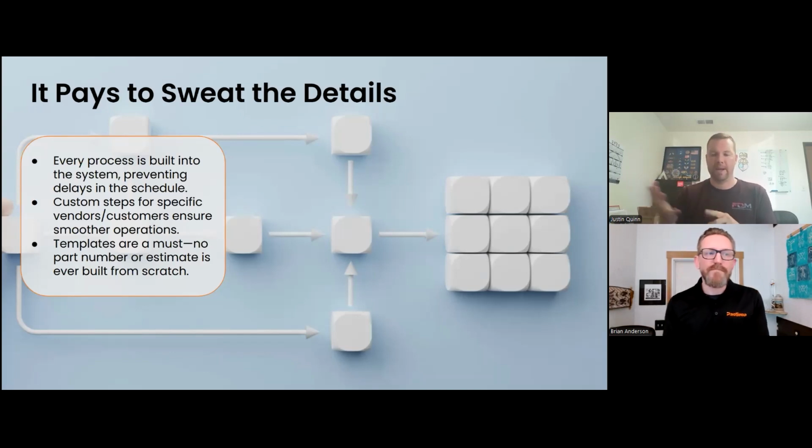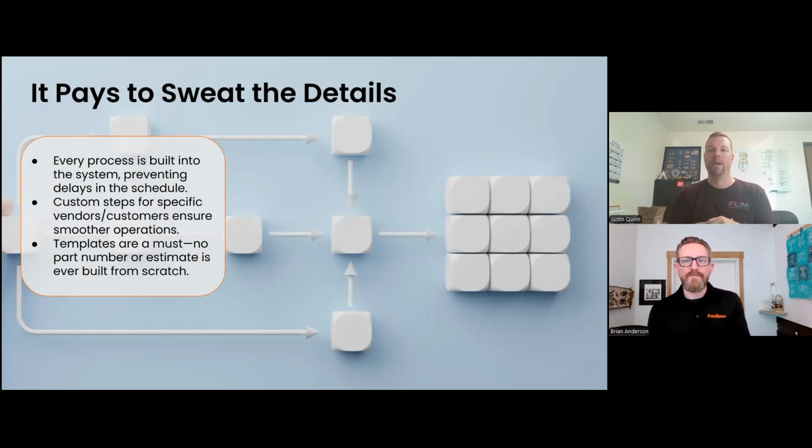We have our manufacturing planning step, which is an actual step on the work order. We have programming and quality checks, both inside quality for CMM programming, outside for part programming. Those are line items on every work order that help us build that calendar and that timeline out.